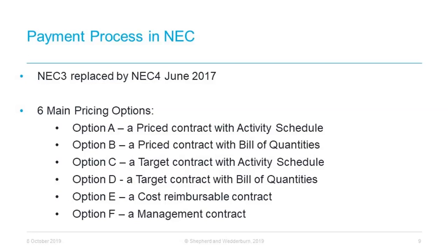Using a simplified example, if an activity schedule requires the contractor to build a wall with given dimensions and characteristics, the contractor may be able to build that wall using many different materials or techniques. However, a bill of quantities will typically refer the contractor to particular materials and equipment, which will then obviously dictate the technique to be employed by the contractor.